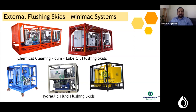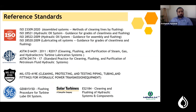These skids address various application requirements: for pre-commissioning where zone standards are not required, for hazardous gas zones where ATEX-compliant builds are needed, and for offshore requirements where MiniMAC builds skids compliant with DNV 2.7-1. Reference standards for oil flushing include ISO, ASTM, MIL standards, as well as OEM procedures and standard manuals from turbine and compressor manufacturers.